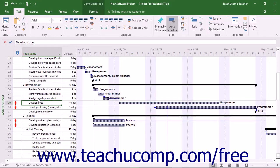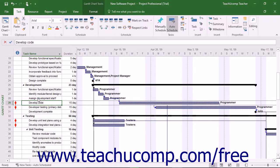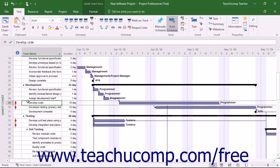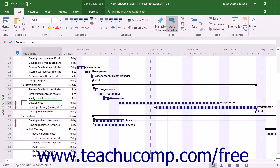In this case, you can use the Max Units field inside the Resource Availability table in the Resource Information dialog box for the programmer work resource to set the maximum hours of availability for the programmer work resource for the different time periods. This is similar to setting different pay rates for work resources, only this time you are changing the maximum number of hours available for the different time periods within a project for a single generalized type of work resource.